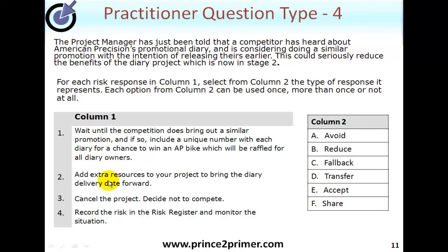Add extra resources to your project to bring the diary delivery date forward. Well, you're worried about the risk of a competitor bringing out a similar diary. So doing yours earlier will reduce the risk. Cancel the project, decide not to compete. Well, what you're doing here is deciding not even to join the game in, so this would be an avoid.